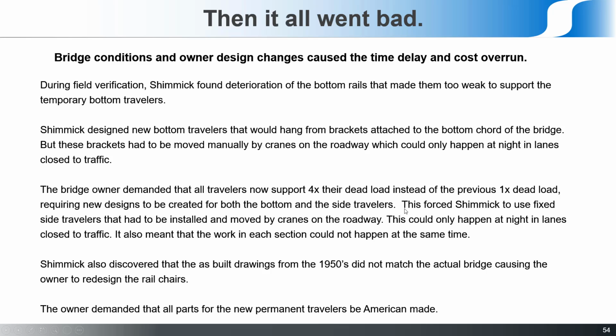And Shimmick's design for the workaround up here with these brackets would handle the weight of the new heavier bottom traveler, but that meant they couldn't use the side travelers now. And so the side travelers had to be replaced not by mobile self-moved things, but by fixed platforms that again could only be installed and moved at night by cranes on the work deck. So that was kind of wrench in the works number 2.